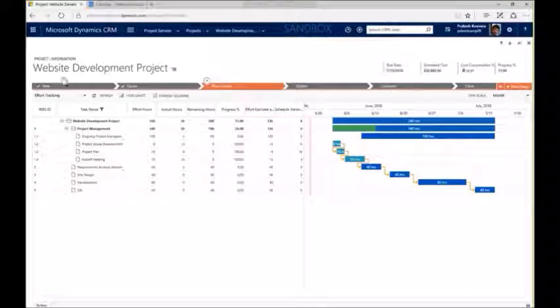Now you can see my Gantt chart on the right looks a little bit different. It has some indicators to let me know what's going on with this project. When I look at the project management tasks, scoping, planning, kickoff meeting have been completed, because the remaining hours are down to 0. Someone has updated the estimate to complete to 0. So that indicates to me that these project tasks are done. So now they're a little bit different color blue, so I can quickly see.